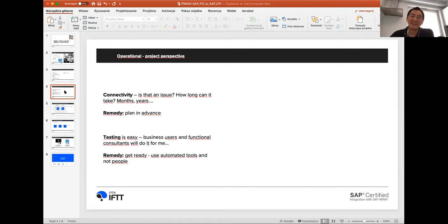We thought, okay, 3 weeks, we are done. We can connect CPI with all systems. And it actually took us double or triple that time. If you're asking external partners, it's different. If you're within your internal organization, you might still be able to handle it fast, but if you're dealing with external partners and you're lining up their network engineers and all those, it is quite a challenge.